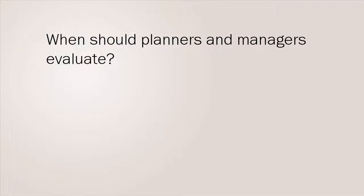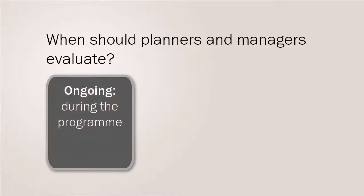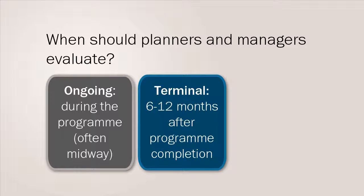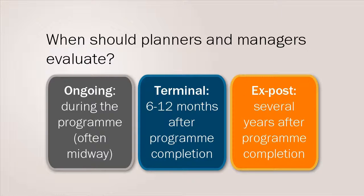When should planners and managers evaluate? Ongoing: during the program, at the end of a pre-agreed time period, often midway through a program. Terminal: this is 6 to 12 months after a program has been completed. Ex-post-evaluation: this is several years after the end of a program, when full impact should have been realized.